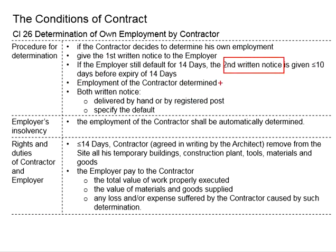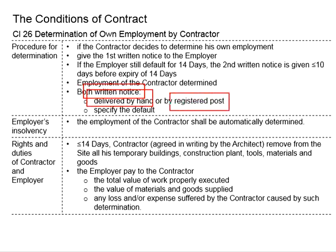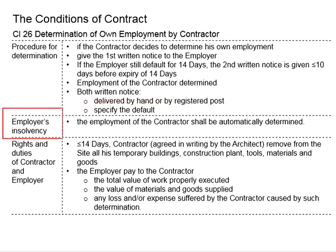After the second notice, the employment of the contractor is determined — meaning the contractor has officially withdrawn himself from the work. This return notice should not be given without good justification. Both return notices shall be delivered by hand or by registered post to ensure the employer actually receives them, and they should clearly specify the defaults of the employer. In the case of the employer's insolvency — meaning bankruptcy — the employment of the contractor shall be automatically determined.